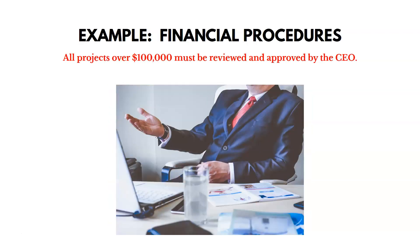Here's another example: maybe there's a policy that says all projects over $100,000 in estimated cost must be reviewed and approved by the CEO. We've got to make sure we follow that and consider it as we plan our project — we have to get that approval.